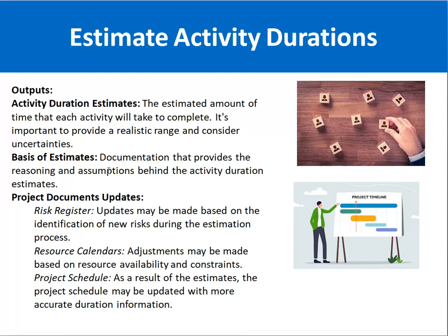For example, you are saying that it will take 1 month. So what is the reason? Maybe the resource is engaged on another project, maybe the resource is not available this month for personal reasons, and so on. So you just have the reasons and the assumptions behind the calculation of the activity duration.